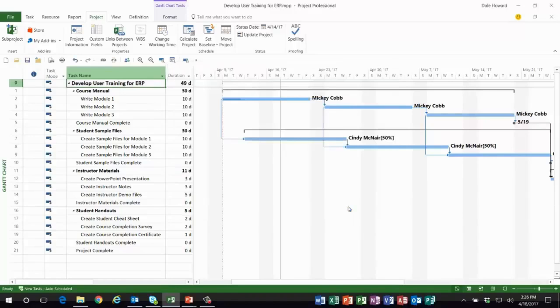And nothing appears on the screen. That's because Microsoft Project by default does not display the status date line as a grid line. It does display the current date line. This is this little thin green line here, but we really need to see the status date line, and I like to make it very bold and dramatic. So here's the first trick, folks.